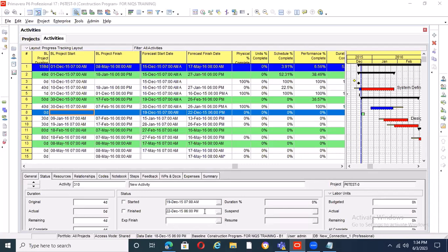If I have a fixed contract, that's fine. But you must make sure that in the contract, if someone is saying, oh, yes, I have a fixed contract, that as a client, I have a 14-day window to review my documents. Any deliverable that comes to me, I will quality check it in 14 days and return. And for 3 months, the man did not, maybe your foundation details. For 3 months, they've not finished their quality check to send back to approve for construction drawing.